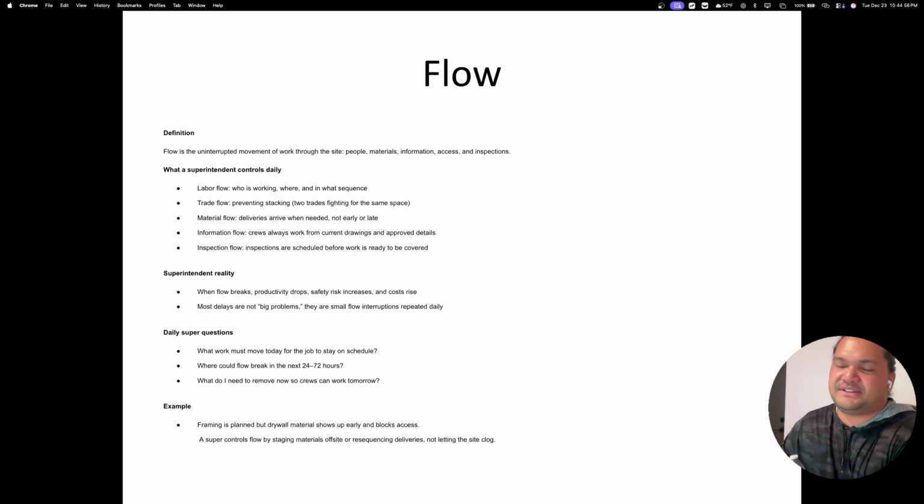On the daily, these are the questions you should be asking. What work must move today for the job to stay on schedule? Who needs to be there? Where do things need to go? Is my job site clean? Where could flow break in the next 24 to 72 hours? So if I am not communicating, hey, I need to schedule this or I need to schedule that, then it just causes delays. Or if I didn't get the right material takeoff, if you're over that, then it just causes delays.